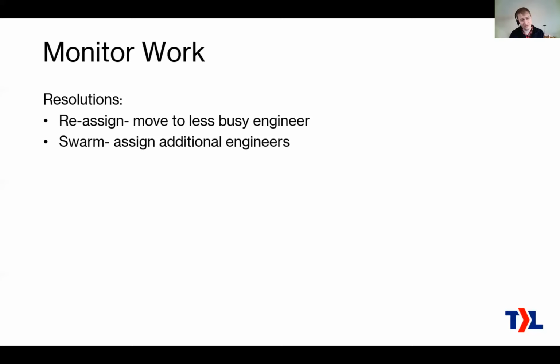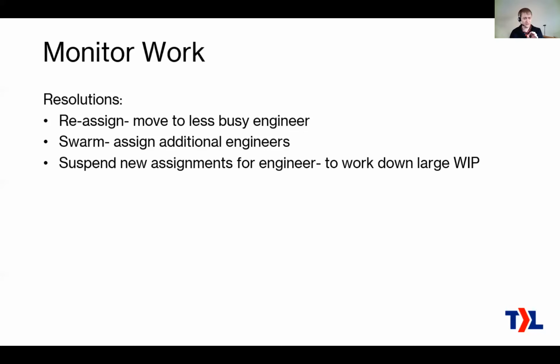One thing you can do is swarm a ticket. That would typically be used if you basically just say, team, okay, we've got to get this particular ticket fixed. It's been sitting here for a week and it is important to the customer. I guess maybe we kind of forgot about it or whatever. Everybody's working on that ticket until it's done, okay? Or until we can see that only one technician is needed to keep that moving forward. Basically say, team, this is our focus until this gets moving forward. Okay, that's called swarming it. It's an agile technique.